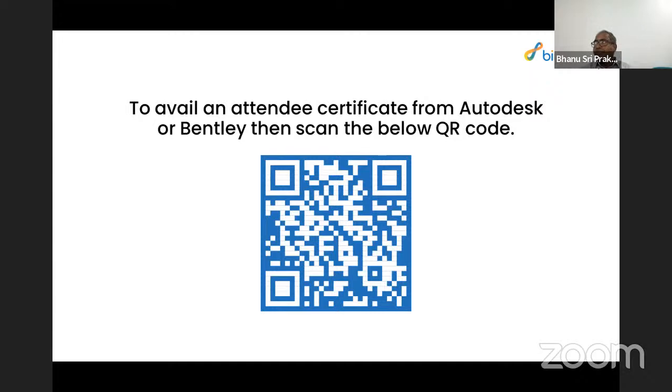Thank you, sir. Next question from Dr. C. Lavanya. As you mentioned in BIM benefits that 30% construction cost is reducing, can you please elaborate in which area it is more effective? So initially itself, I showed those benefits. One of the first important aspects, 61%, you could see, is the errors which are created by us. It is not incidental. It is most of the time created by the consultants and the contractors. Errors and omissions within the drawings can phenomenally reduce. In that way, you will be reducing the unnecessary RFI process, request for information, wrong construction, and demolition. Those kinds of things are one of the major aspects.